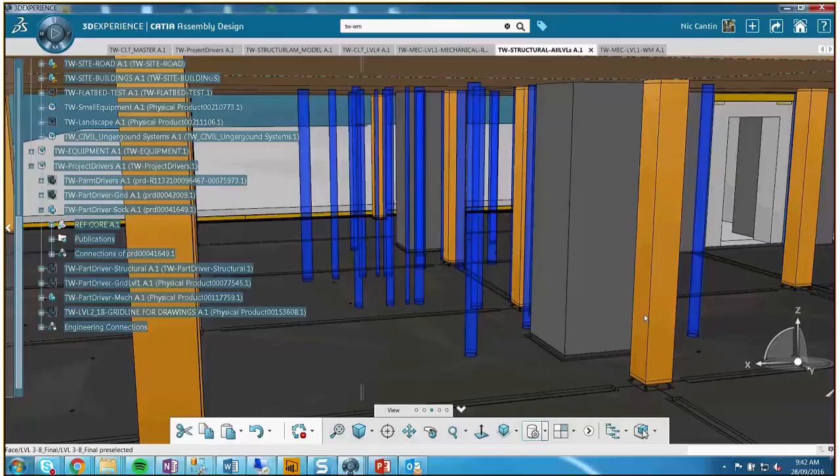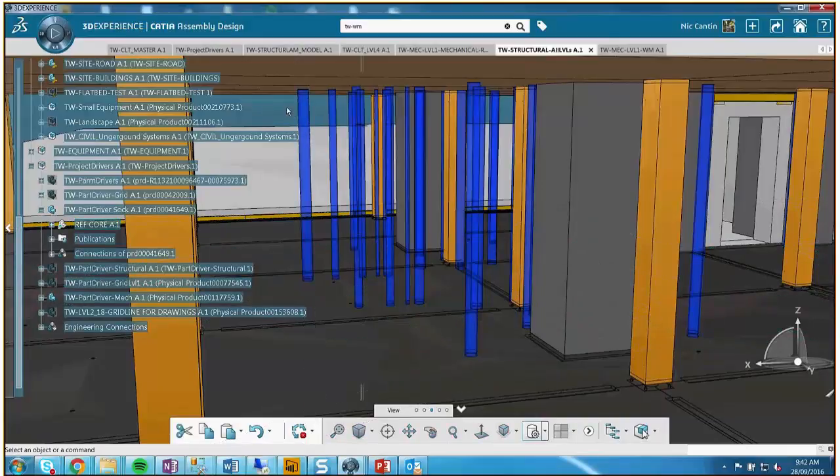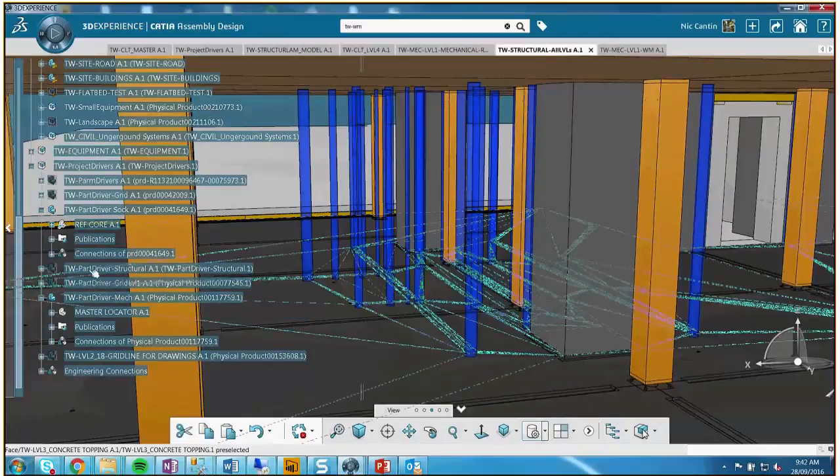They recreated shop drawings from our model, and we reviewed it with the design team to make sure it was going to work with the rest of the building. And they actually did QA/QC on every single column, I believe, which they said was more QA/QC than they've ever done on a project. So they were doing their own internal tolerance QA/QC before it left the shop. Okay, yeah, I understand. Thank you.